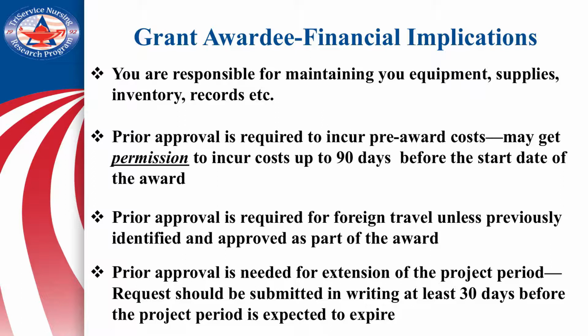You cannot receive more money if you don't have approval, and obviously you cannot receive a no-cost extension if you don't have approval. A request for a no-cost extension must be submitted in writing at least 30 days prior to when the project period is expected to expire.